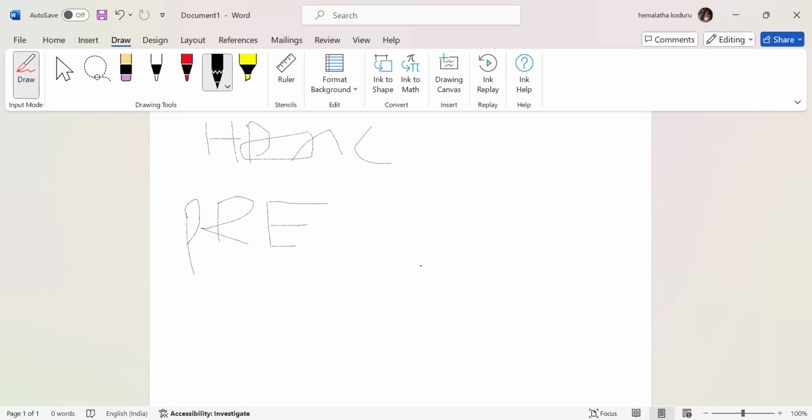Cutover activity is nothing but moving your period-ending balances, like the previous year's and previous month's balances, directly, but not directly into your system. There will be a firefighter system in the middle, created by the Basis team. You will execute all your cutover activities in the firefighter system, which is directly synchronized with your actual system. The actual system is nothing but the production system.